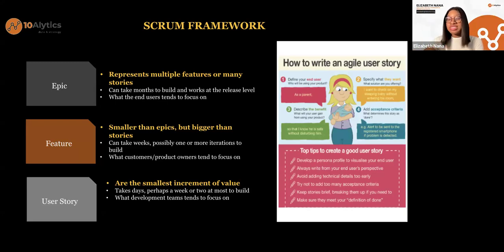Now, there's a format. There's a method to this madness. There's a format when it comes to writing user stories. Again, define your end user as a user, right? I want to, what do they want? So that, the benefit, all right? As a user, I want to, so that.